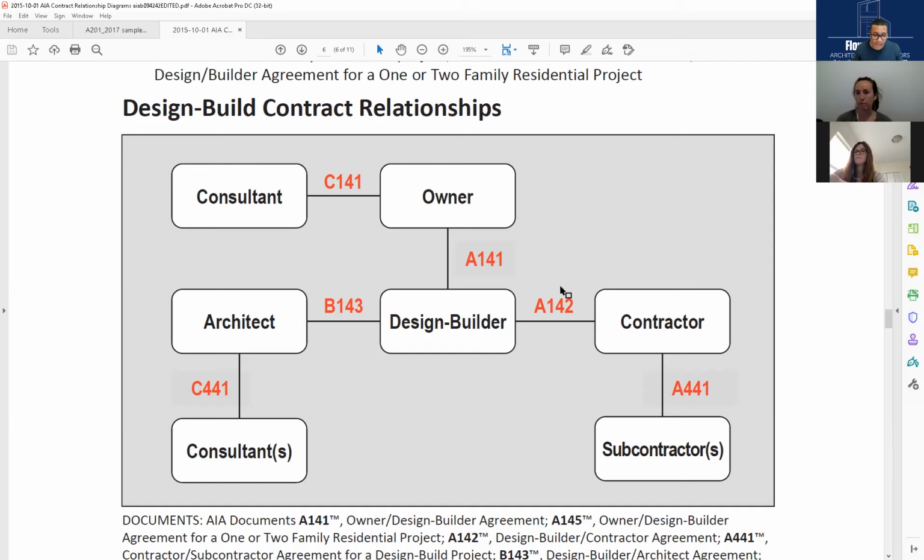One is in my contract, which I probably should have, a little clause on the unforeseen conditions, like, hey, patchwork on things that we cannot infer are not included. Like we couldn't really ever dream that this was not level. I've done projects like this, and there was one that was clearly not level, and we poured concrete on it, and it was like $3,000 worth of concrete. So great, we knew it. We opened it, we knew it. We knew we had a problem.